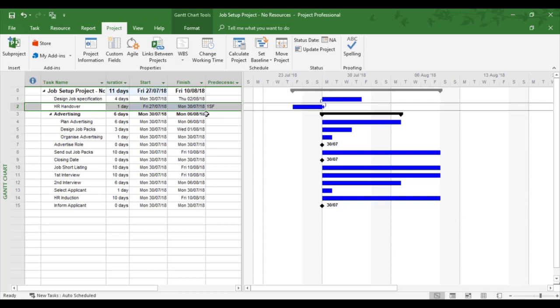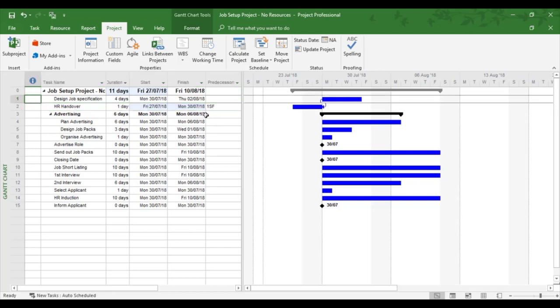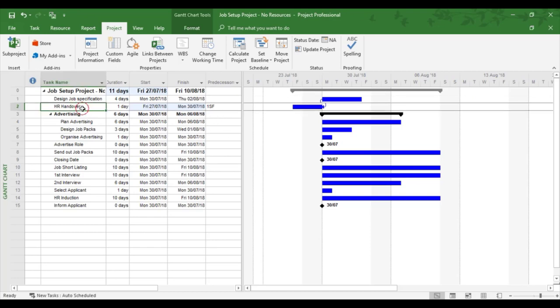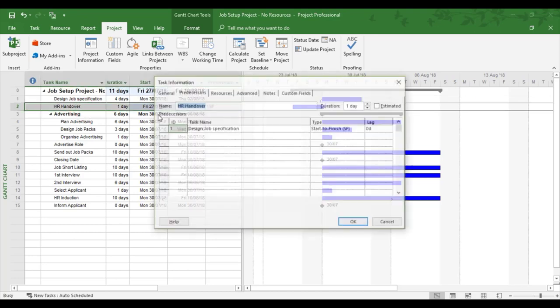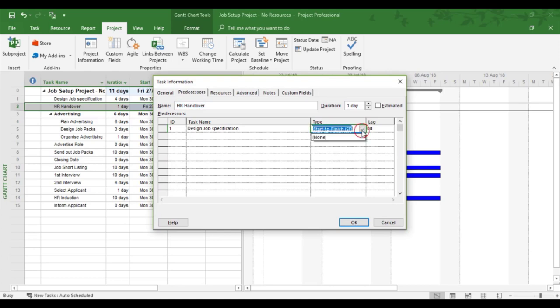I'm now going to do the double click again. But to show you again, there's a way of writing it in. That's one SF that needed to be written in. And none to remove a link.